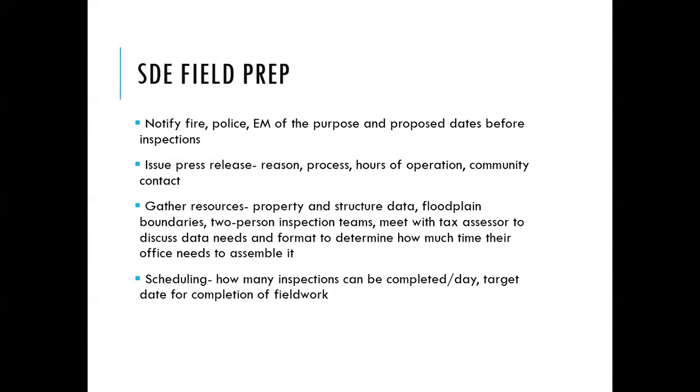So definitely want to work with the fire, police, and emergency management departments and let them know what your purpose and proposed dates are for inspections, because you are going to be entering people's houses and that kind of thing. So we want to make sure that we're being safe and that everyone is aware of what's going on and why we're doing it. Issue a press release, the reason why you're doing inspections, what the process is, what the hours of operation are, and your contact information.